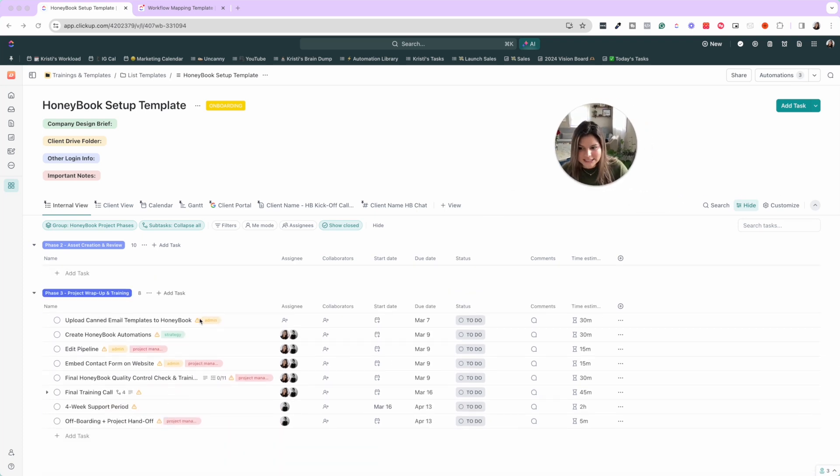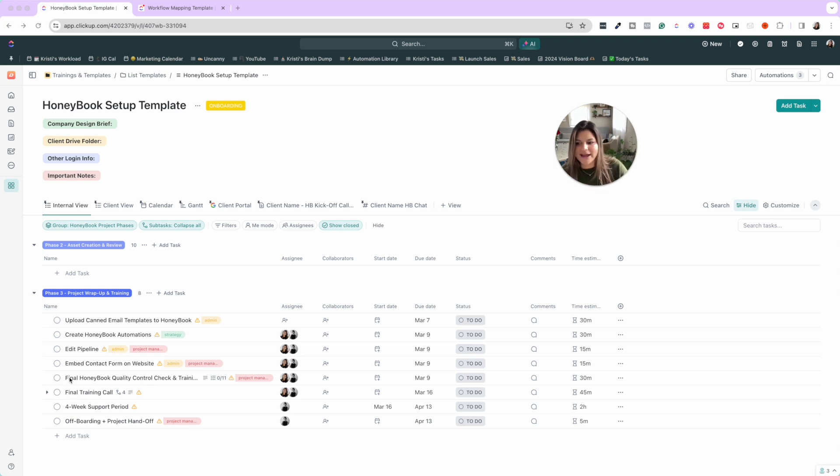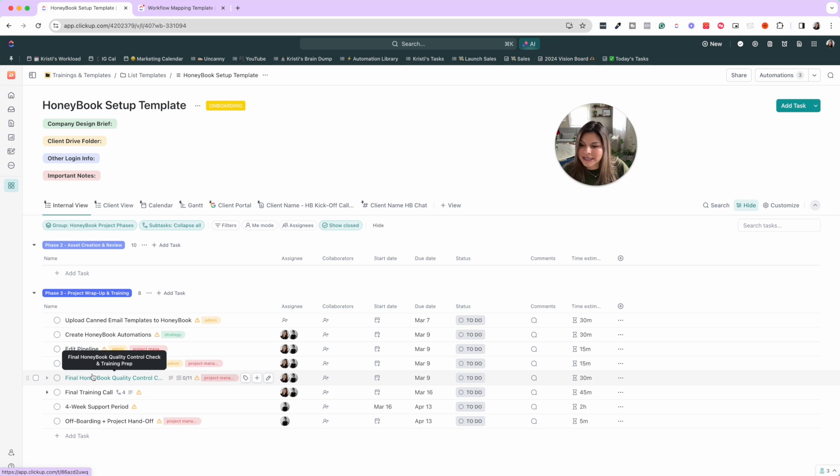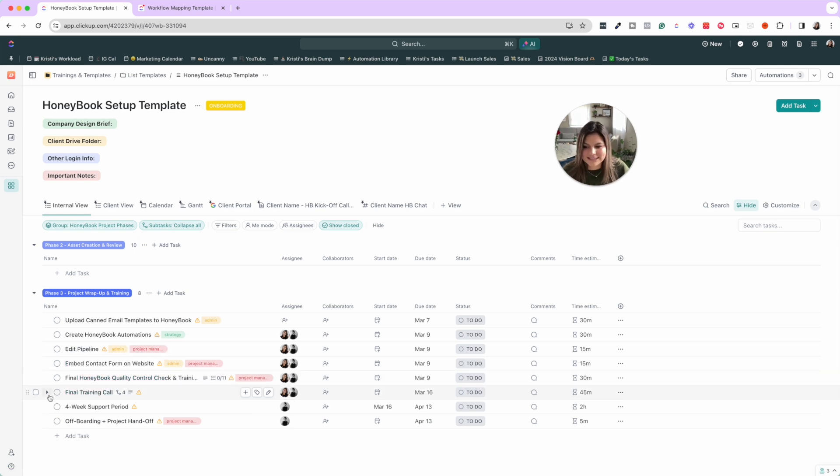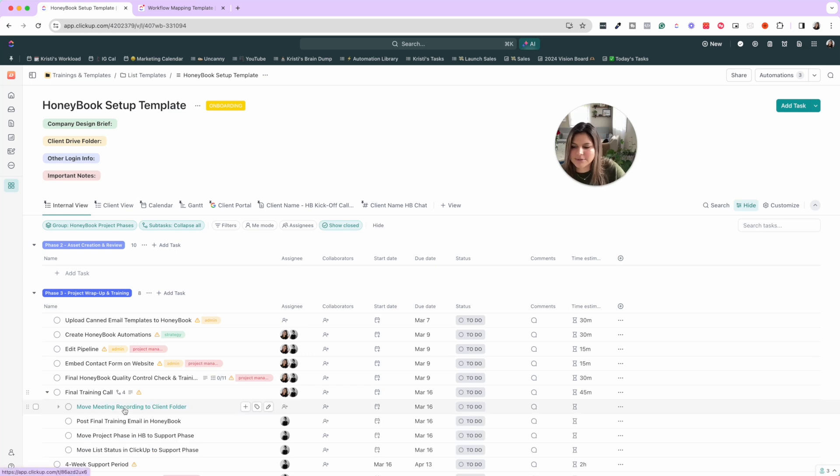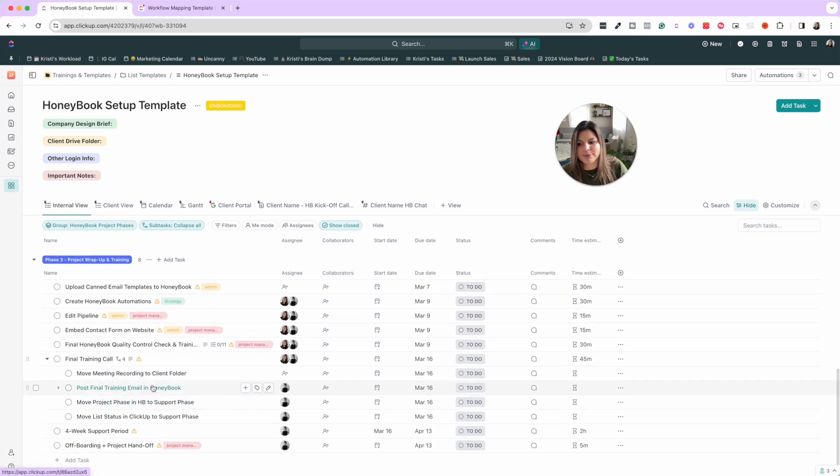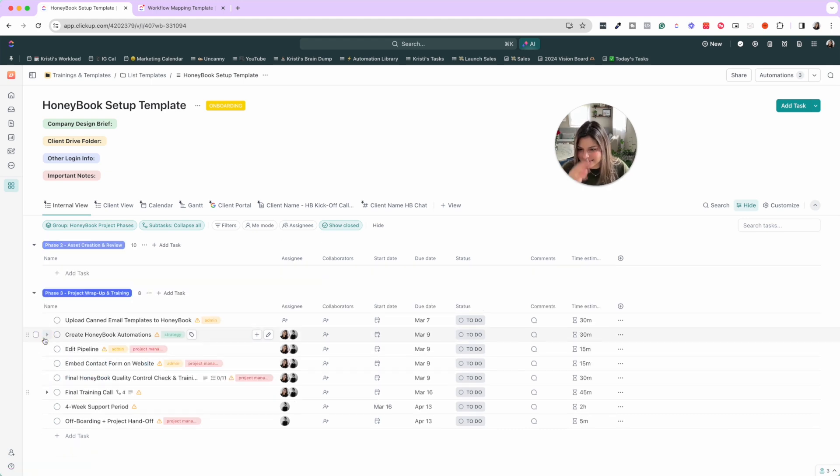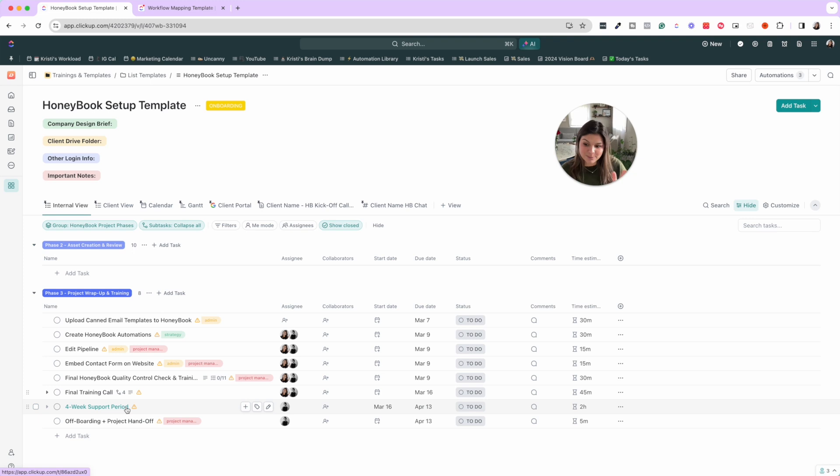So we have to upload the canned emails, create the automations, edit the pipeline. We have final quality control and training prep, the final training call. What has to happen after, we have to move the meeting recording to the client folder, post the final training email in HoneyBook, move the project stage and the list status. Then we have a four week support period and then offboard the client as well.